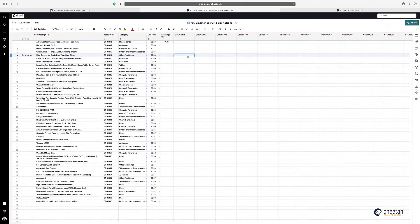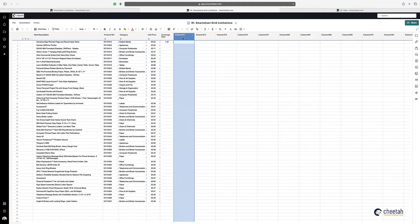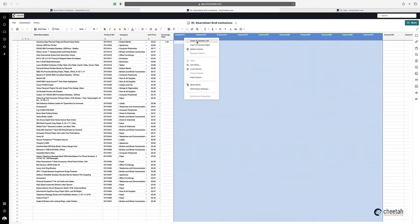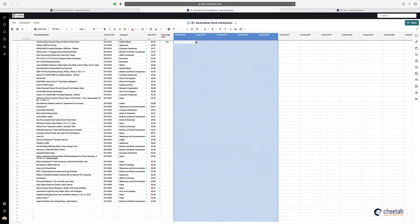The first limitation within a grid in Smartsheet is you can only add five columns at any one time. So if I wanted to add ten columns or more, I highlight the columns, right-click, select insert, and you can see there's a limitation of five columns. You can only insert five columns at any one time.